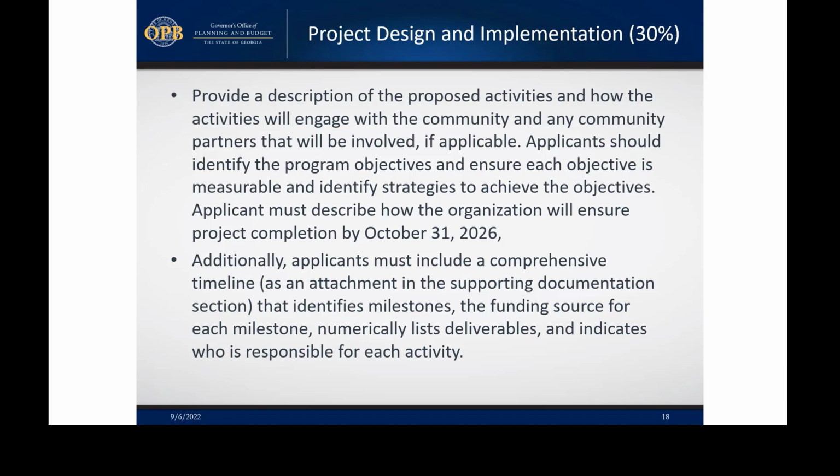Additionally, the applicants must include a comprehensive timeline as an attachment in the supporting documentation section, which I refer to as a task, I think, in the application, that identifies the milestones, the funding source for each milestone, lists those deliverables numerically, and indicates who's responsible for each of those activities.